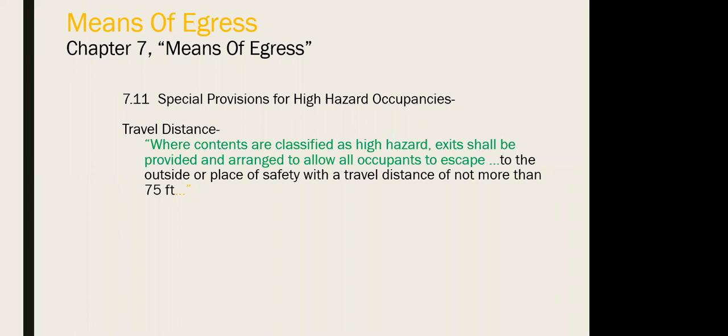The location and the number depend on the lux level calculation, and this is part of the submission for the civil defense design. Even during the inspection, they come with the lux meter and check the average lux level, and the diversion time, how long it takes to divert from normal to emergency supply.